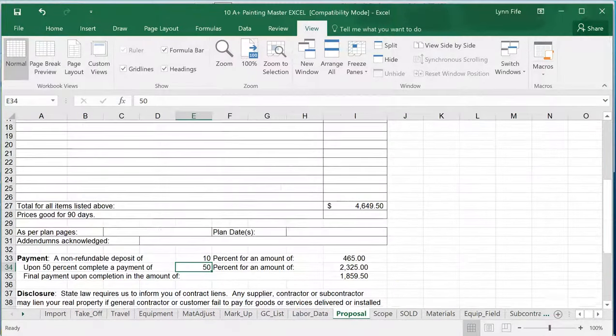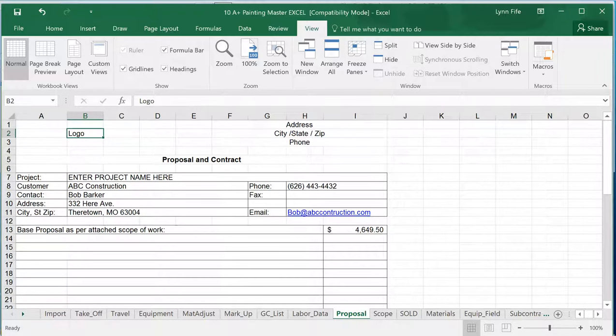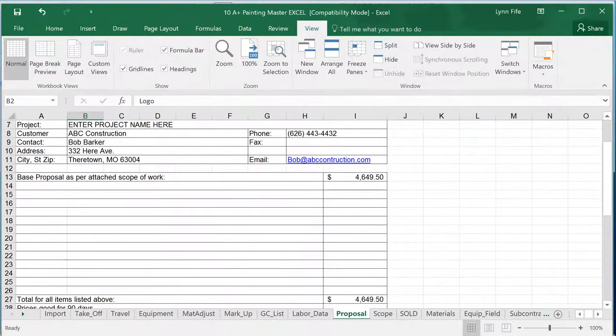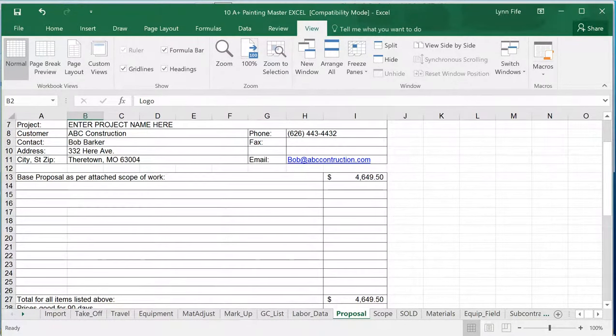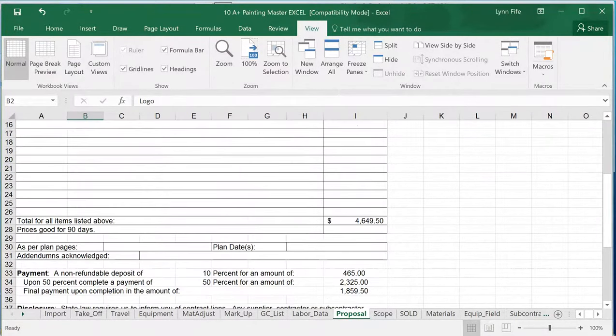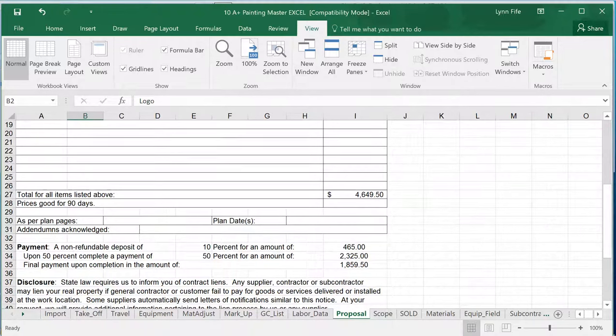It gives me an automatic proposal sheet. The proposal sheet is where you would drop in your logo up here, your name, address, city, state, zip up here, and then it will automatically drop in the price down here where you can put in some alternate prices in here if you wish, and it will automatically calculate a down payment and progressive payments if you wish, or if it's to a contractor, you can just leave that blank.